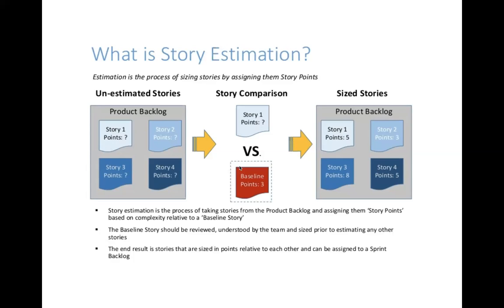Now coming to the new user story. For the new user story, we created most of the tasks we did for the baseline, and now we are able to see that we are going to create some extra tasks for the new user story, like tuning, performance testing, and we need more extra integration testing for this user story. So compared to the baseline user story, we need some extra time for this new feature